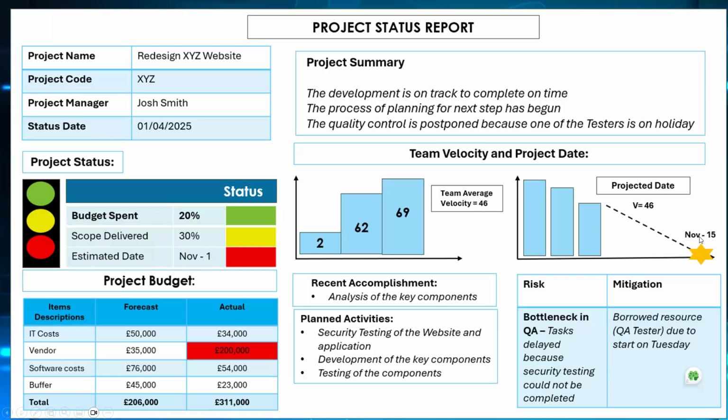And it's saying now that, okay, as it is now, the projected date to release this particular phase is November 15, and that's why you have this as amber, because they're expecting it by November 1st, but now it's going to be November 15. Okay, so this helps to explain this project status better for this team.